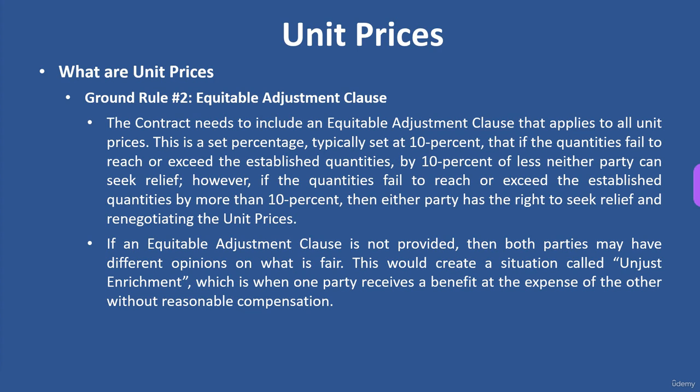Or if he goes over by less than 10%, he doesn't ask you for a change order. You both assume a little bit of risk. That's why the 10% is there. So we just keep it simple, because the change order process for a small amount of money isn't worth it. No one wants to go through the paperwork. So you keep it simple and agree to agree.